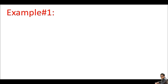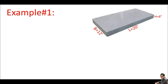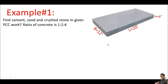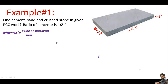Now let's do the first example — a PCC slab or PCC work. The dimensions are given and we are asked to find cement, sand, and stone for the given PCC work. The ratio is 1:2:4. All values are given, so let's go straight into the solution. The formula is: Material = (Ratio of material / Sum of ratios) × Dry volume.